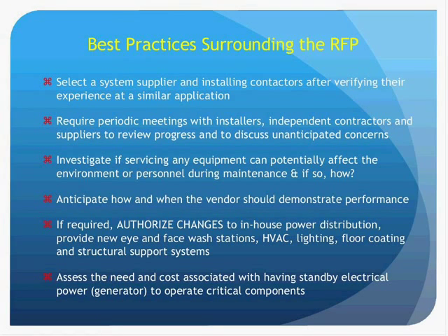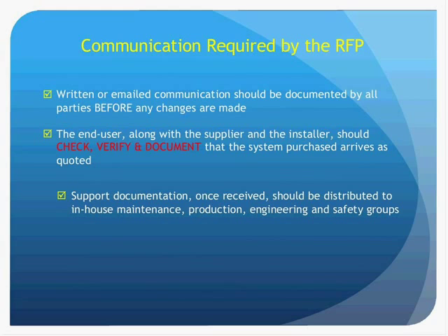When appropriate, authorize changes to their in-house support systems following discussions with selected suppliers that would occur before any equipment arrives, and assess the need and cost associated with having standby electrical power, such as a generator, to operate critical components. Next slide, please.